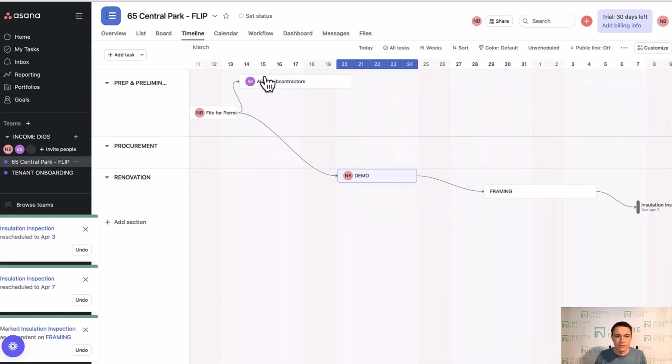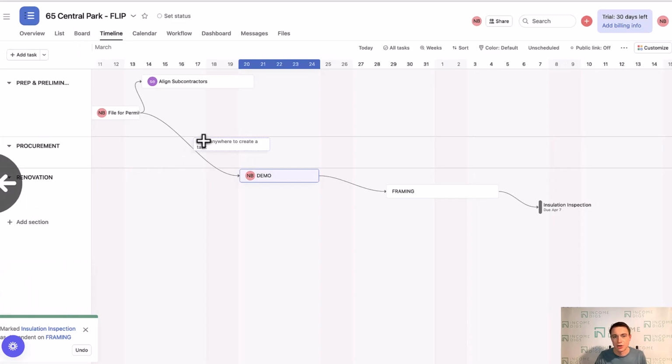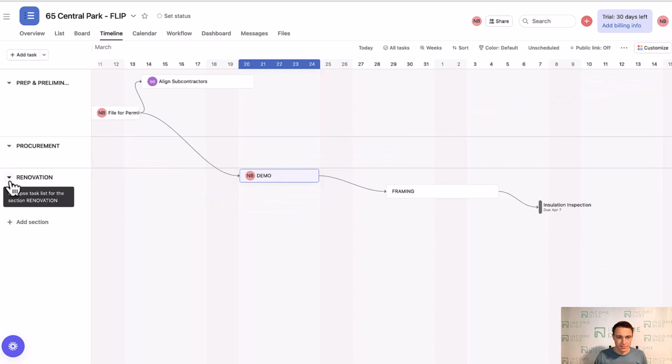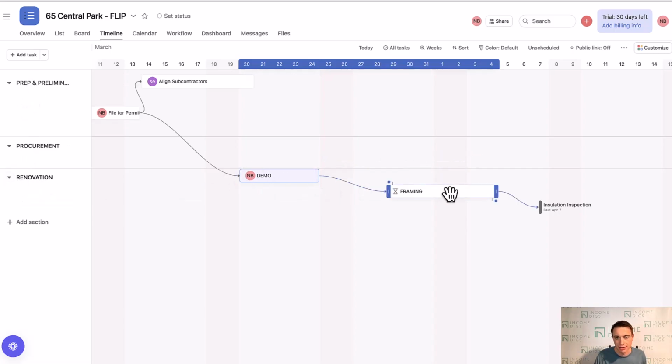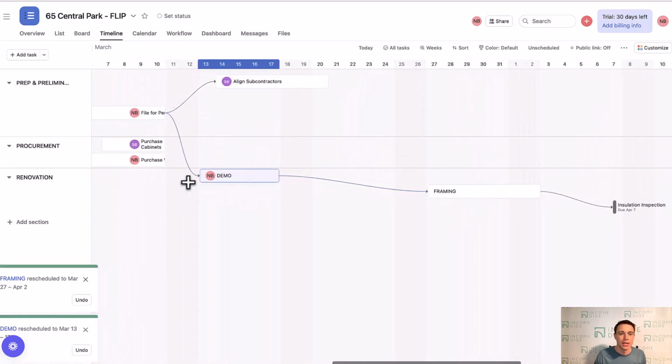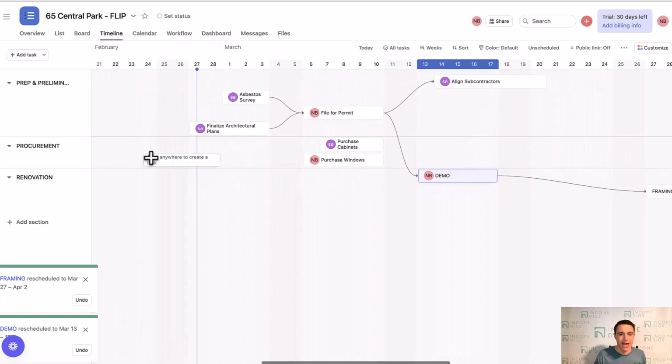This timeline view is completely new. I can click all these drawers to have it show up a little bit better. And of course, we can still drill down into our tasks. I can click on the task and see other items here. Super useful, super awesome. And you have your sections here as well. What you might want to do with a template like this is some phasing. Those of you who are used to Buildertrend have some kind of phasing. Maybe you have demo and rough-ins, then drywall and paint, then carpentry. That might make sense for your sections, so you might want to give that a try. You can tell, it's a complete game changer when it comes to the tool versus just the list. We have power here.